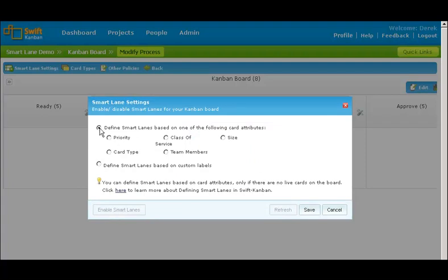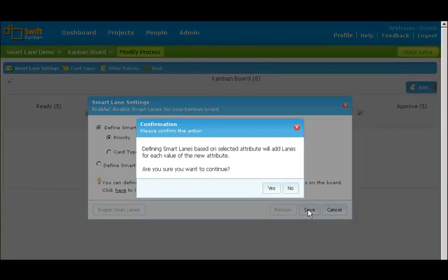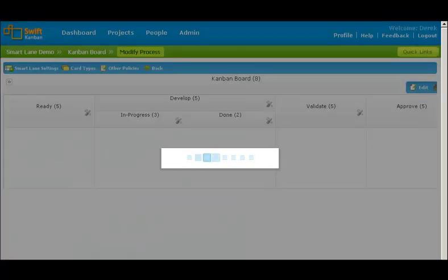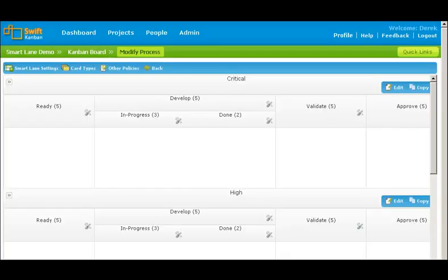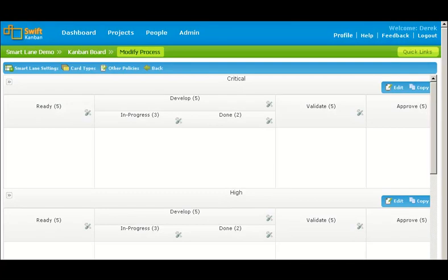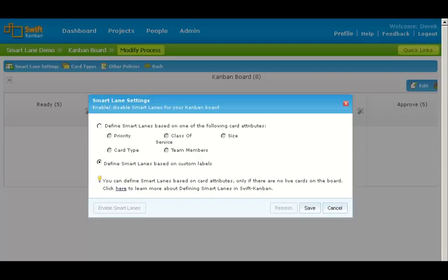You can define smart lanes in two ways. If you select the first option, you can generate smart lanes based on any of these card attributes. For example, let us select priority and save. The board will have smart lanes for each of the priority values, i.e. critical, high and so on.